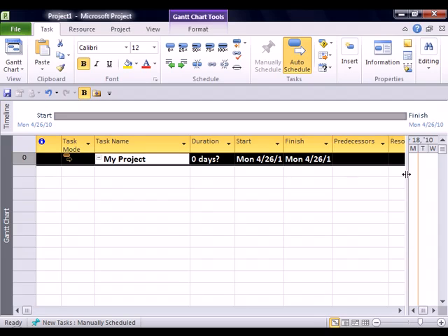You don't have to do this, but it is something that I do like to do, and you can't just insert it and turn it on as a project summary task without first going into properties, then going into options on the advanced tab and checking that box to turn on the project summary task. You can't just insert it on the task menu.